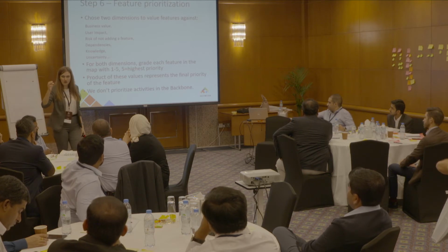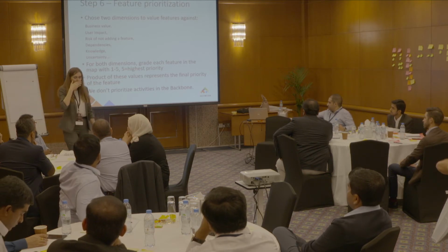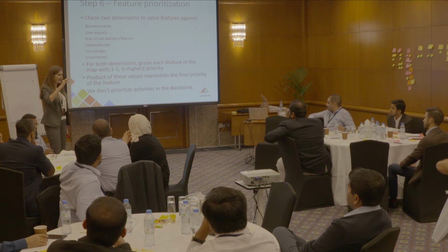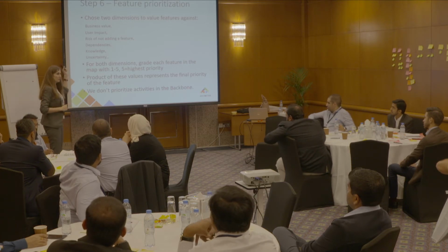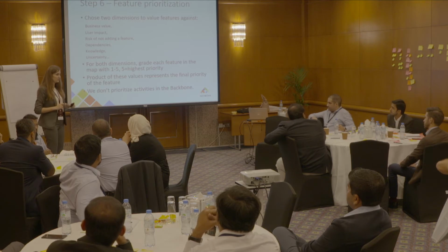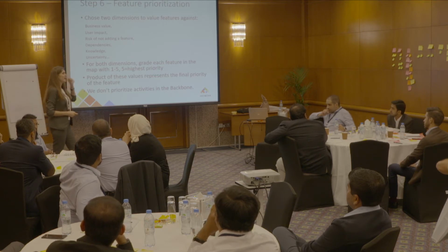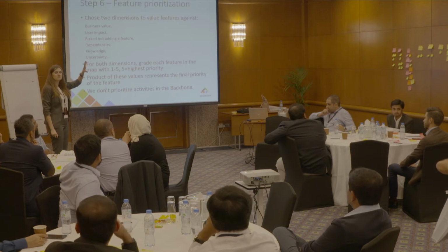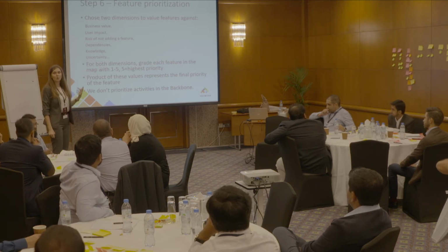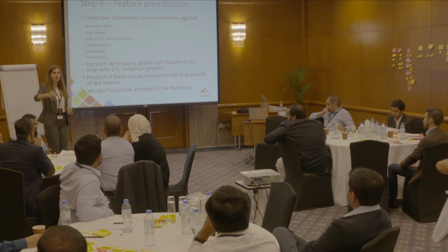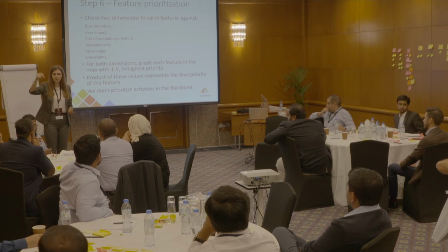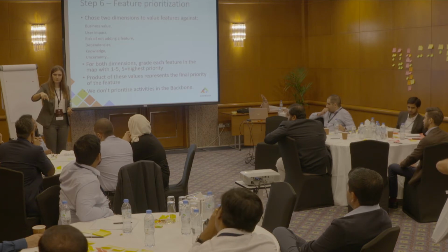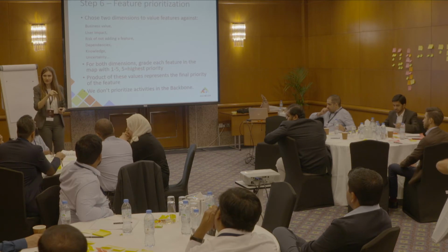Then give points from 1 to 5 for the business value to each of these tickets that you have. We do not add points to these big epics because they're there only for the organization. What I do expect to happen is that the walking skeleton gets all 25s, 5 times 5, which will not be the case with your example because you have too many stories, too many tasks.